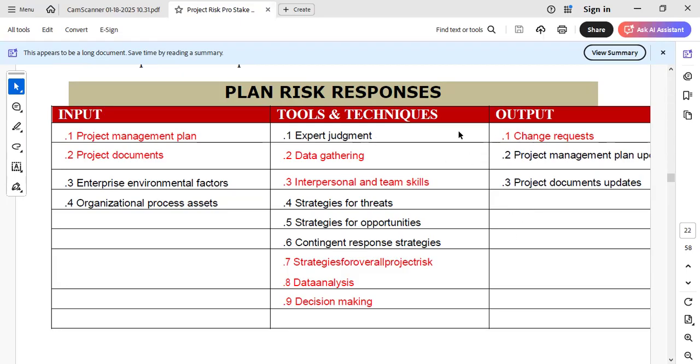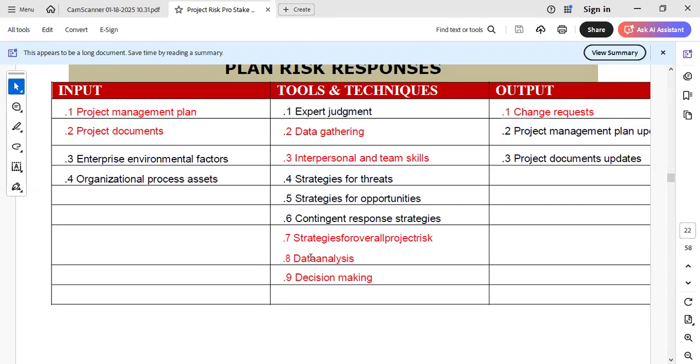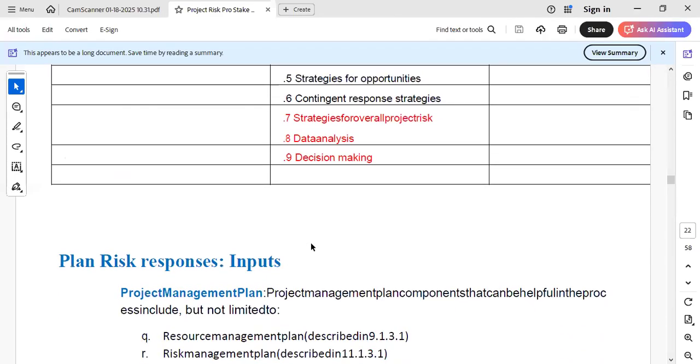Then, now that we have new knowledge and things we will do, if things are not well identified that are found in the project management plan or in any of our subsidiary plans, we raise a change request. That is where we have change request already as our output. And with these new knowledges, we update the project management plan and all the project documents will be updated.